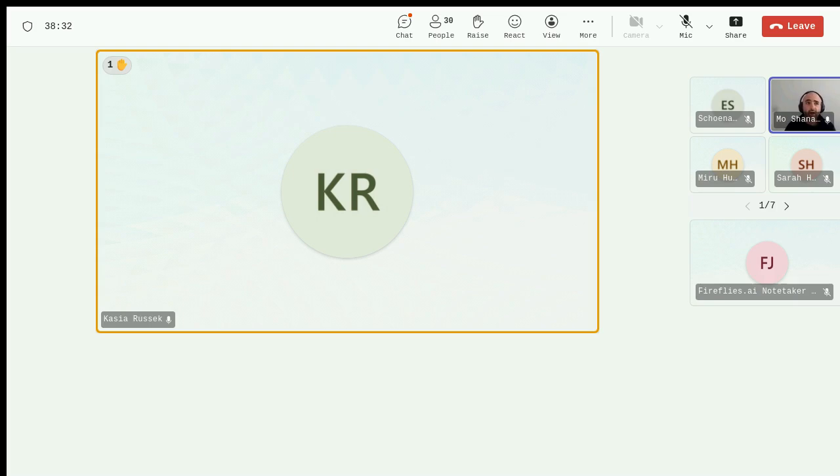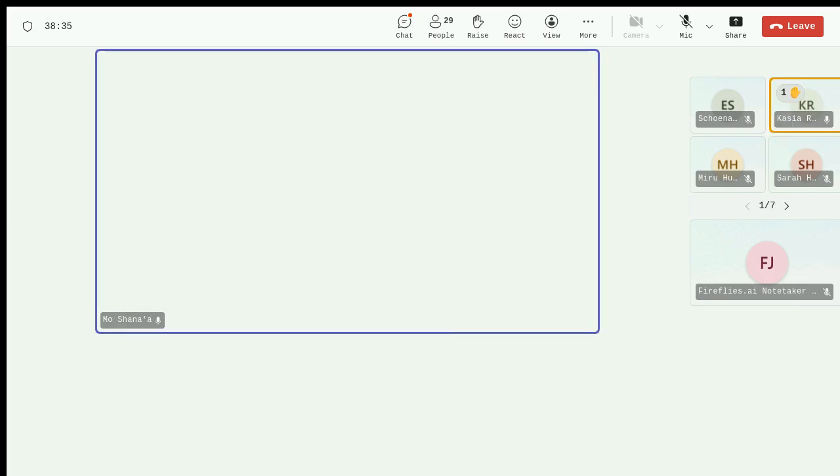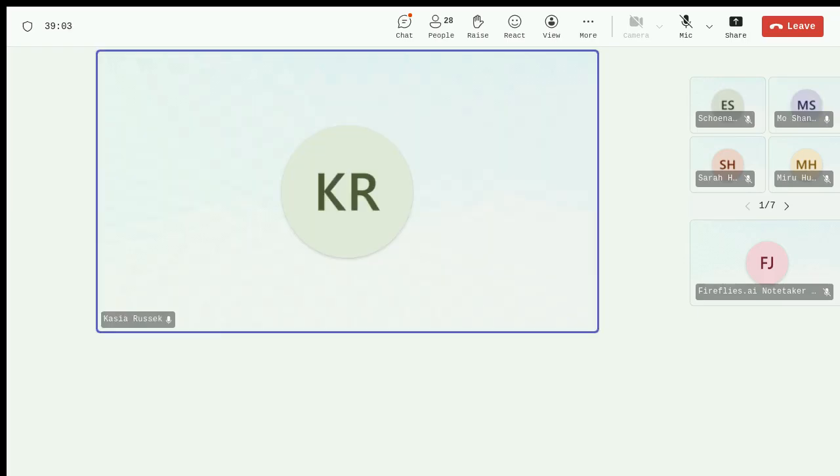So the link in Asta right now is mainly around importing the data of the program from Asta into Morta. And then if you want to use Gantt views in Morta, yeah, you can do that. But mainly the integration itself is to pull in data from Asta into Morta. Okay, so I can combine our tracker from Morta with Asta. Yeah, so you can combine it with the IDP, the information release schedule. You can link them back to activities in Asta.